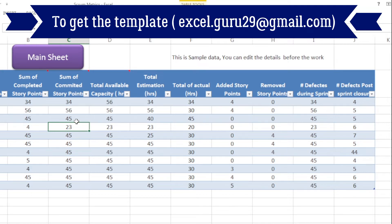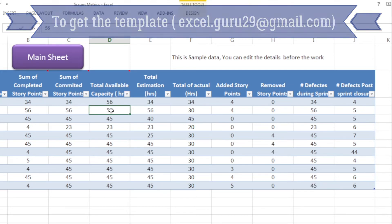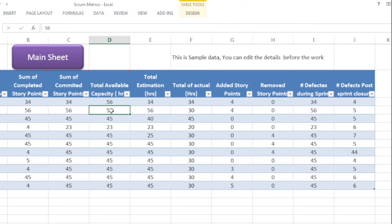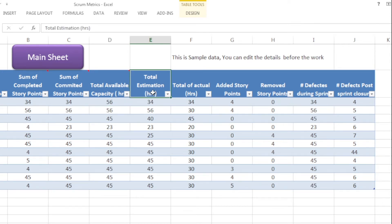Next to it you will see sum of committed story points. Committed story points are what your scrum team or individuals have committed at the start of the sprint, so you need to put the sum of committed story points there. In column D you will see total available capacity in hours. If you have seen my earlier templates, you can find out what your available capacity is after excluding leave hours, holidays, or ceremony hours. I'm sending the link in the description field so you can access that video as well.